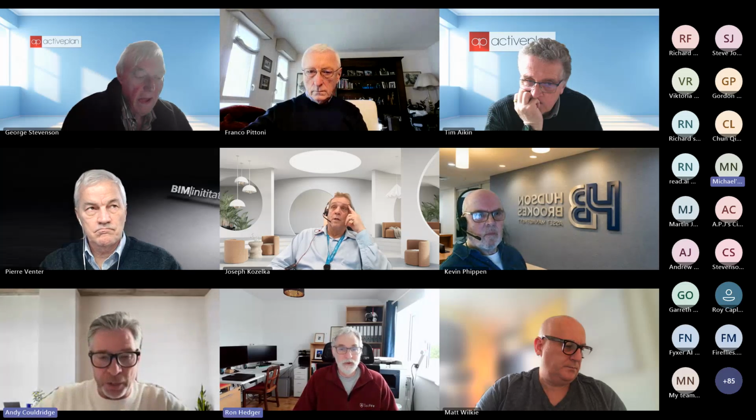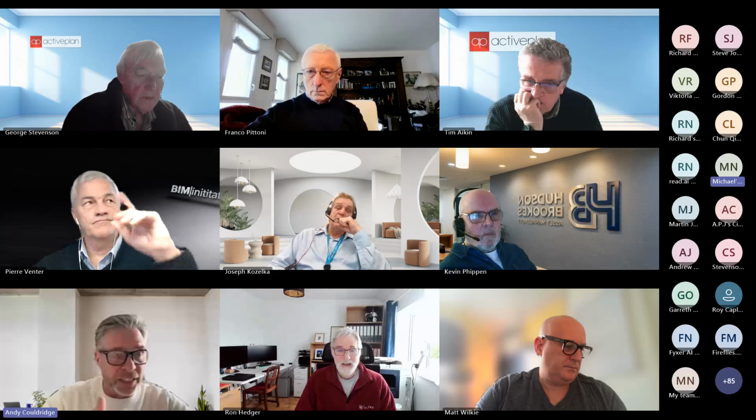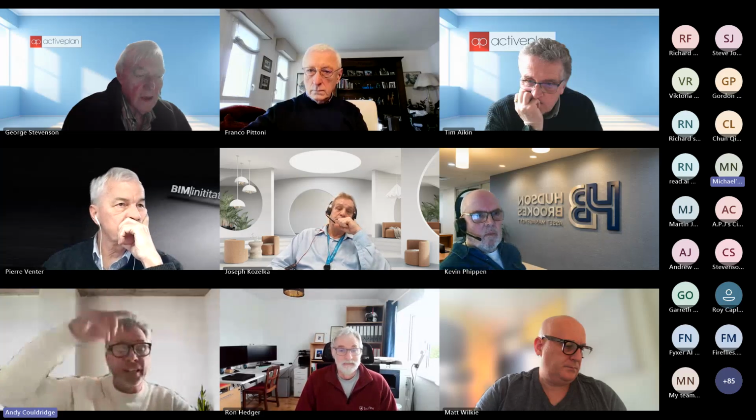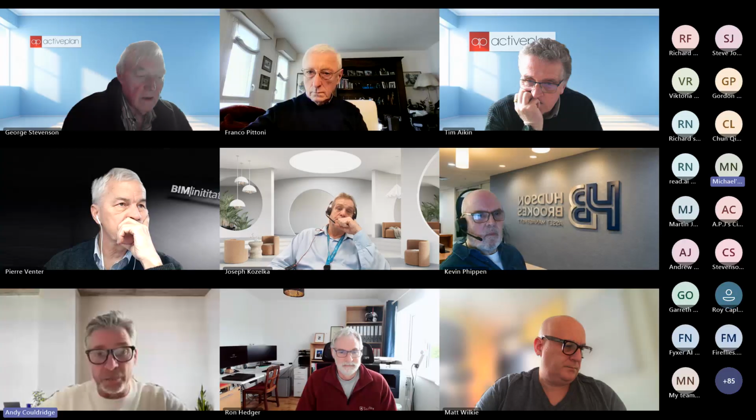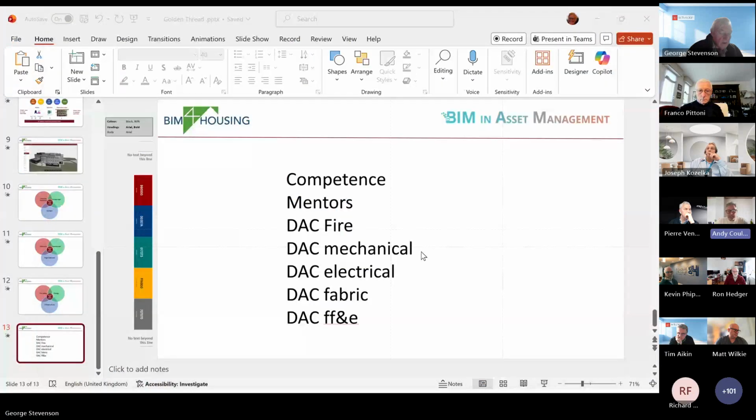And I don't know what the answer is, but I think you can't beat the good old-fashioned actually getting someone to have a look at a cable that runs 27 floors that actually isn't the right specification cable and equals a mandatory occurrence report, because it's not the right type of cable. And that's a real example.